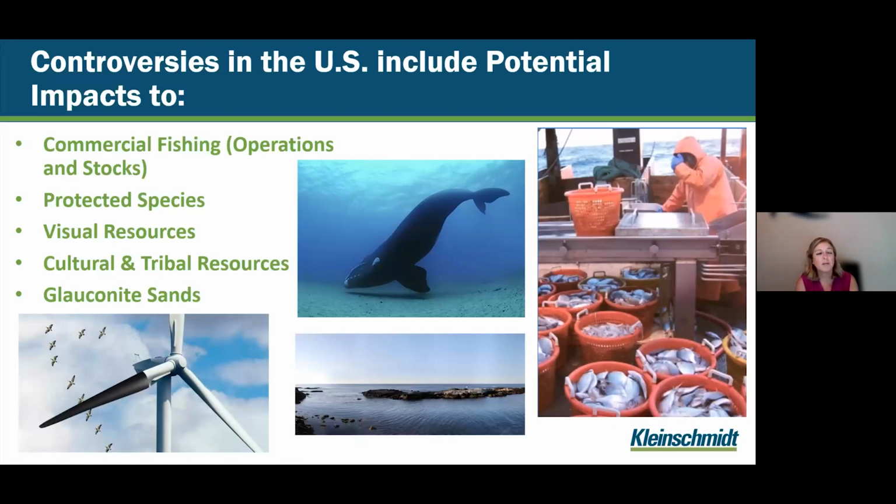And the reason I bring it up is my point earlier about your regulatory framework and the sequence of the steps matters, is because when the developers are committing exorbitant amounts of money, millions up to $1 billion for this polygon in the ocean, they have not done these surveys yet.